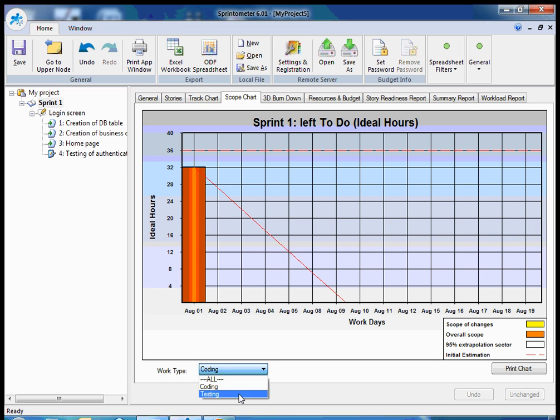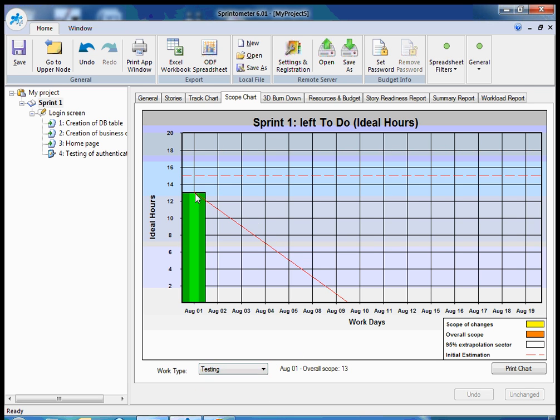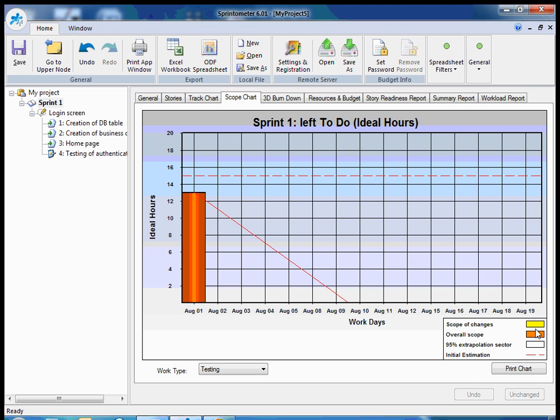You can also look at testing, for testers. And because I have just a single story, I should finish my scope rather early. But normally, this line should go to the end of the sprint, to August 19th, in case of an ideal situation where we're completely on track.